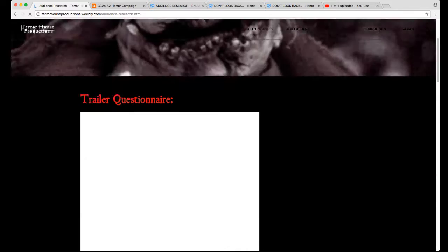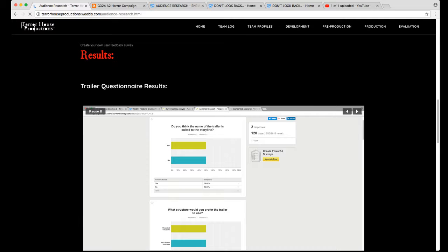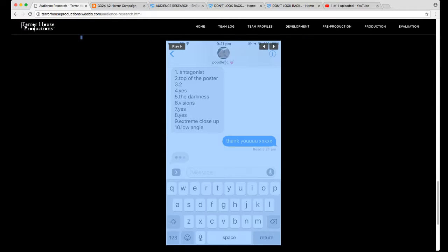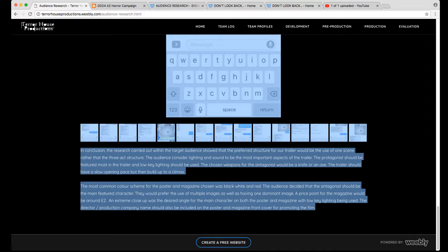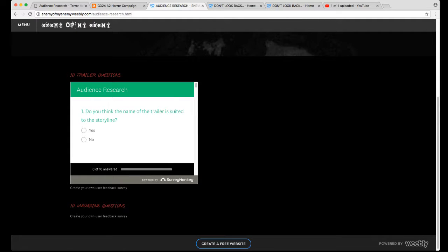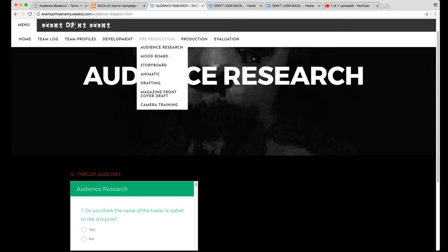As you can see here, you've got your questionnaires, you've got all the results. This is the section that's still yet to be done, actually getting the results and all this stuff. We can't actually proceed with any of your filming or planning until you have your audience research in. So until this has been done by student 1 and completed, we're kind of sitting in the dark at the moment, waiting for the audience to tell us that information.